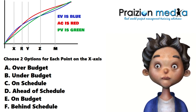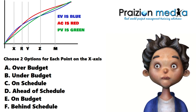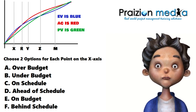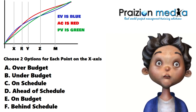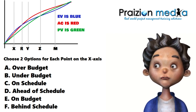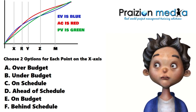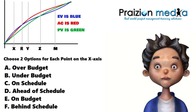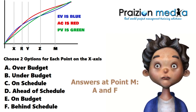At point M, you can see the earned value line is below the planned value line and the actual cost line, which is unfavorable for both time and cost — or for you 6th edition purists, for both schedule and cost. So the answer for point M is A, over budget, and F, behind schedule.